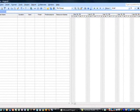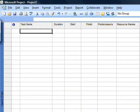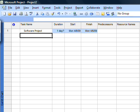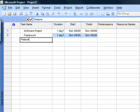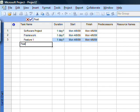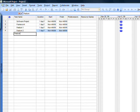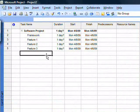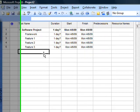With that set, let's look at the items. Give the project a name — let's call it Software Project. We'll create four software tasks. Let's do a little architecture first, and then let's add some features: Feature One, Feature Two, Feature Three. A word about work breakdown structure: it is essential that you break down the work to the most discrete level and create your estimates from there. A deliverables-oriented work breakdown structure is essential.